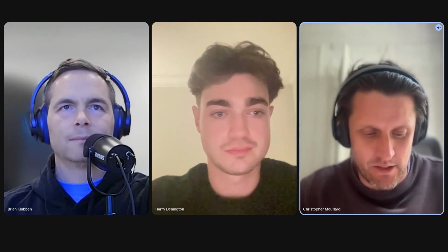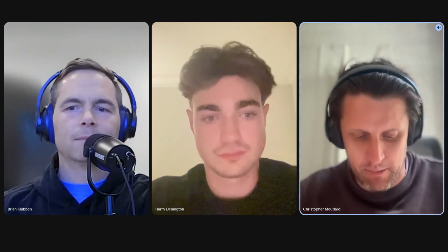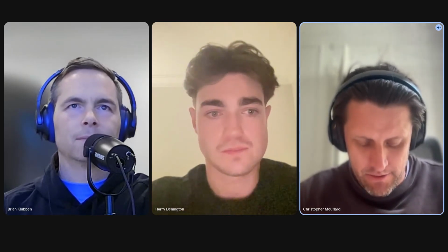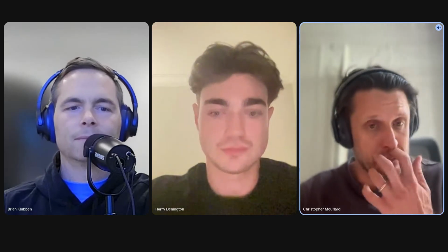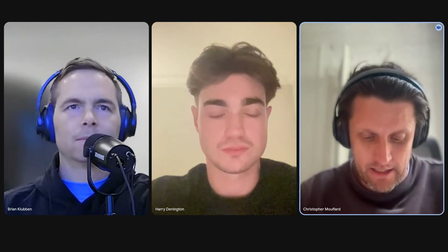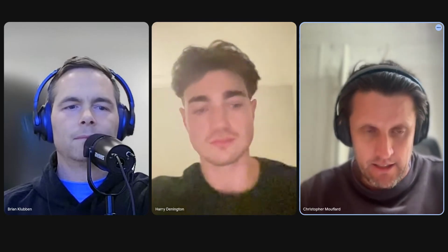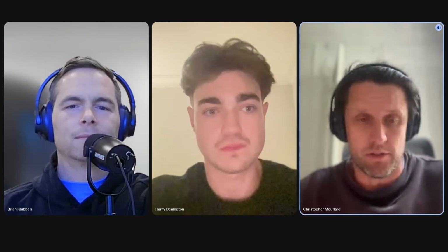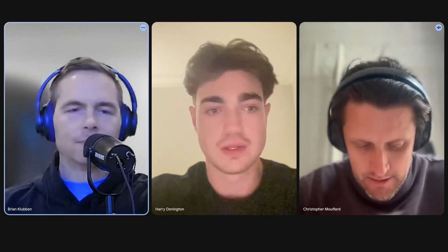And the headaches that causes, because, as you said, Harry, it's however long it takes for the architect, designer, or engineer to get back to you. And then I think probably the most costly, unless you guys disagree, is incorrect dimensions. If there's a discrepancy between one thing and another, what are we supposed to do? Oh shit, we did that thing, and now we're in the hole for it, or the owner's in the hole for it, and we're going to have to redo work, causing delays and unnecessary spending.